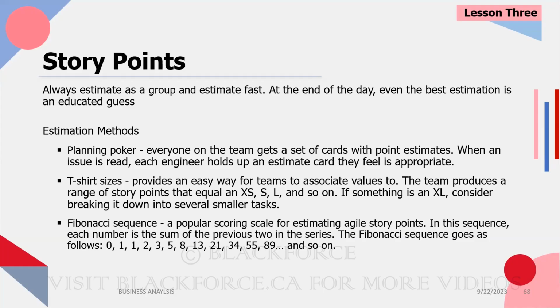So again, they read the user story. Somebody is going to say 5, right? The reason they said 5 is that now that they know the complexity of 2 and 3, they can read the story and say, actually, this is more like when I combine the complexity of 2 and 3, so it's a 5, and then they say 5. So if you look at all of this, right, it's just different ways of doing the same thing. What are we looking to do here? As a team, can we agree on how long it will take to build this requirement based on how complex it is or not? Okay.